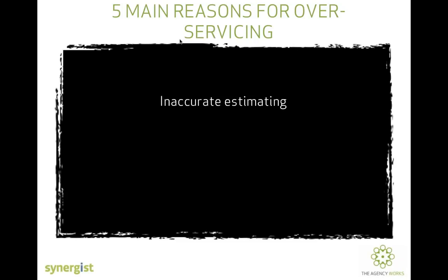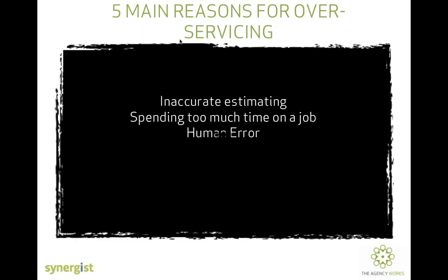So we've got inaccurate estimating. We've also got things like spending too much time on a job. If we're not giving our studio team the correct number of hours, which we've estimated accurately, that's going to cause them to go over. Also human error, which obviously cannot really be helped. It happens from time to time.